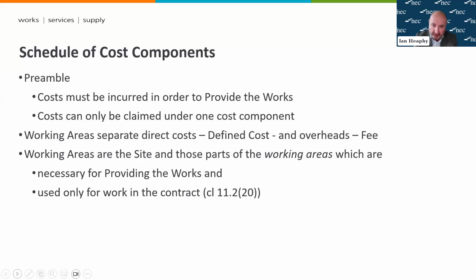Also, costs can only be claimed under one cost component. So we need to make sure that costs included under people are not reappearing under other cost components. That cost can only be claimed once.